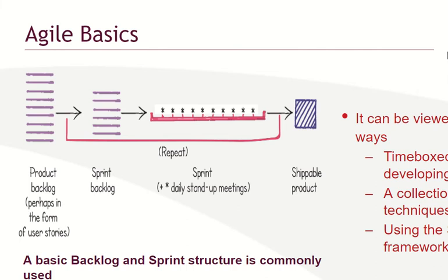All right. So agile basics. What are the basics of agile? In agile, you are to consider three key things. One, you need to time box what you want to do. Time box means you need to have a start time and end time. You need to agree what you can do within a particular time.